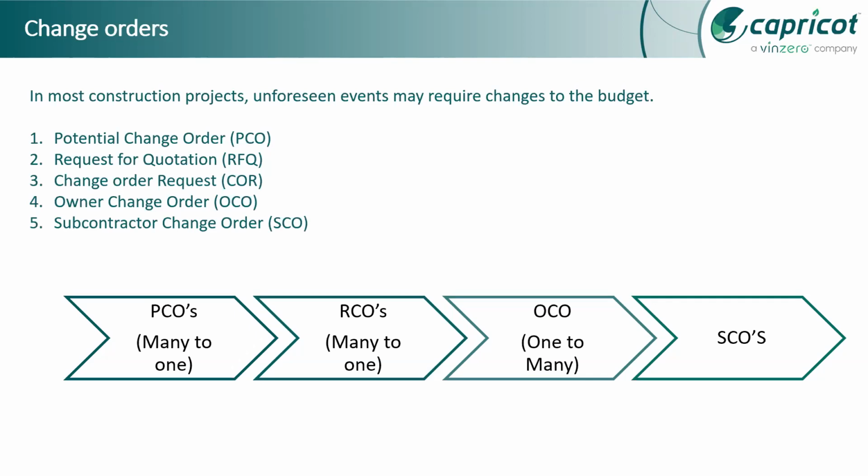So let's say if the cost is within the premises of the general contractor, it will go to the subcontractor for approval. But if the cost change is major and needs approval from the owner or more funding from the owner, we send it across to the owner change order and get it approved. So this is the workflow that it follows. Again, there are a lot of inbuilt changes that we can do, or there can be multiple different situations for which we need to work on.